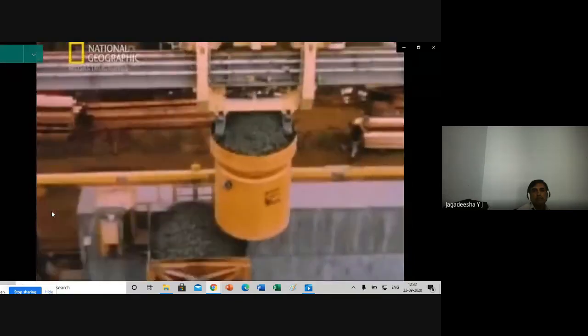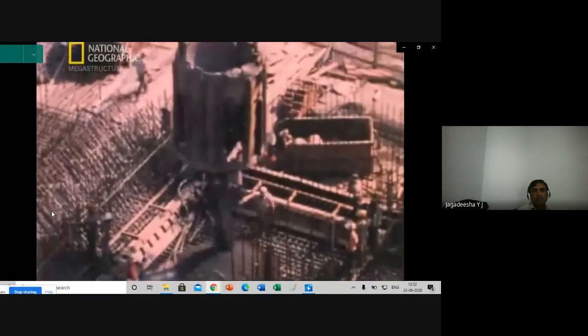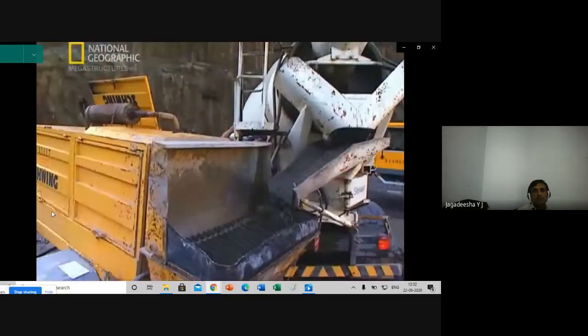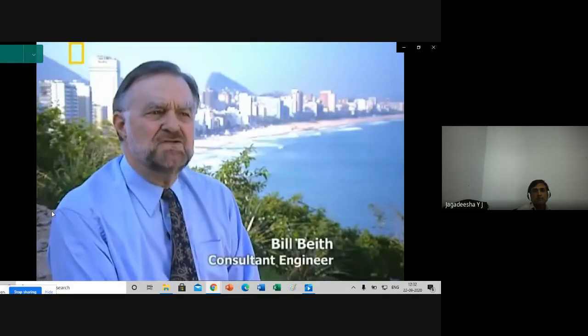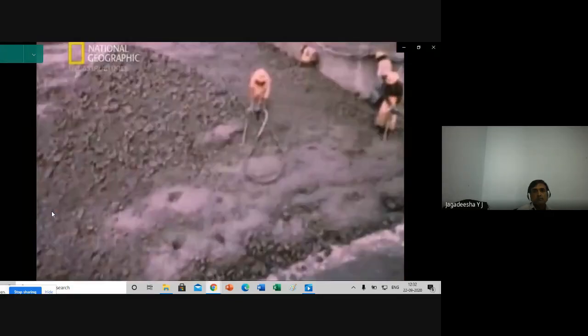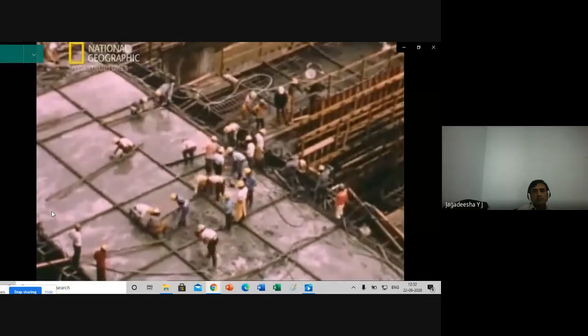Overhead cableways were now feeding the dam's insatiable hunger for concrete in a continual round of supply and demand. This cement was being trucked in over thousands of kilometers. At one time, something like 1 40-ton truck every 20 minutes. Cement. 40,000 people were working at a rate equivalent to raising a 20-story building every 55 minutes.